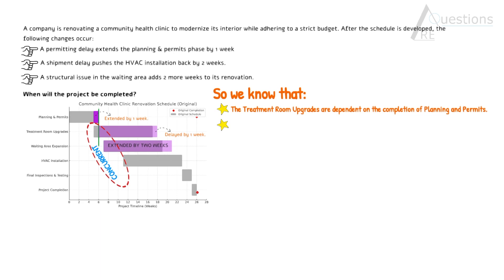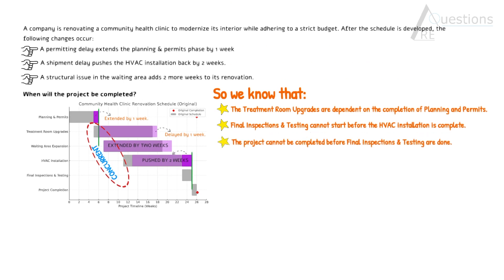Importantly, final inspections and testing cannot start before the HVAC installation is complete. We know that HVAC installation is delayed by two weeks. This will also push the final inspection and testing process, because final inspection and testing is dependent on the HVAC installation activity. And lastly, the project cannot be completed before final inspection and testing are done. Since that process is pushed by two weeks because of the HVAC installation delay, the project completion will also be pushed by two weeks.